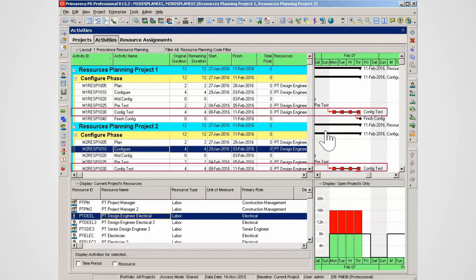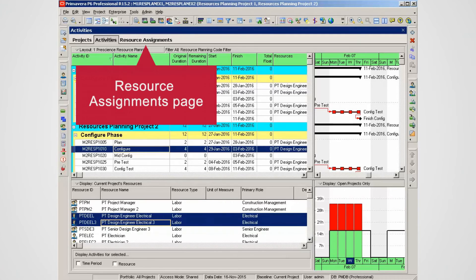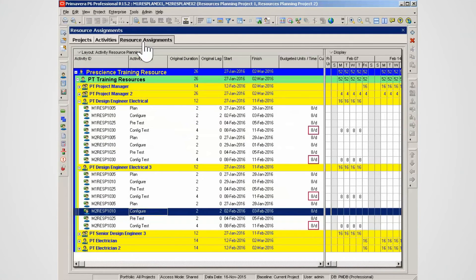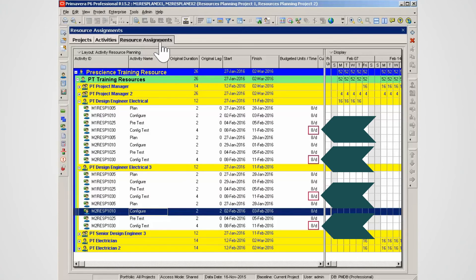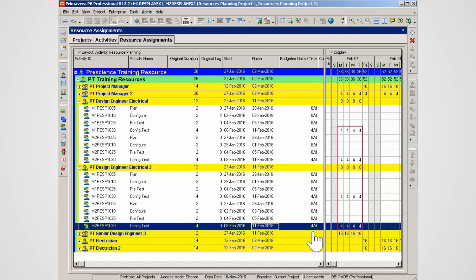Note that design engineer electrical is also over-allocated on configure test activities. Looking at both resources again, you can see the total over-allocations. Return to the resource assignments page. In the resource assignments page, you can resolve the over-allocation by reducing the time each resource works on each activity. Note the eight hours budgeted unit time allocation for each activity — change the budgeted unit time to four hours a day on all of the conflict test activities.